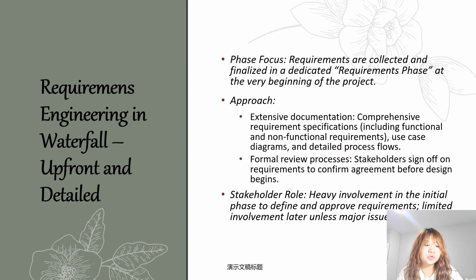In Waterfall, requirements engineering happens entirely in an initial phase. We create detailed documents, a comprehensive spec covering both functional needs, what the software does, and non-functional needs like performance or security. Stakeholders review and sign off on these docs to confirm alignment, and after that, their involvement is minimal, unless major issues come up.